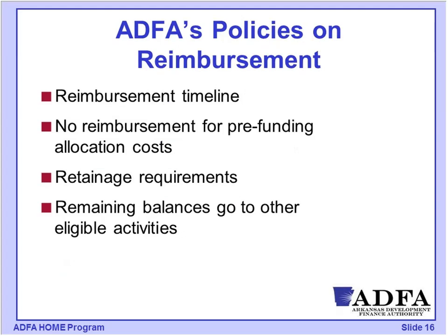Let's talk a little bit about the ADFA policies on reimbursement. As part of your written agreement, the reimbursement timeline will be spelled out. Now keep in mind with the federal dollars, these are based on reimbursement. So once you have incurred a cost for completion of a portion of the project, you would be seeking reimbursement with ADFA. They will be drawing funds through the IDIS system, which is why we have to have it set up in advance so it's ready for that process to be completed.